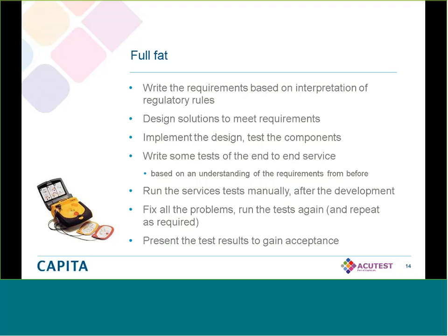And sometimes I talk about this as if it's salami. Rather than having thin slices of salami, this is like taking great bites out of the sausage, and it's really quite unpalatable in some ways. And then you implement the design, you test the components, and you write a small number of end-to-end tests right at the very end, and then you discover probably you misunderstood the requirement in the first place.